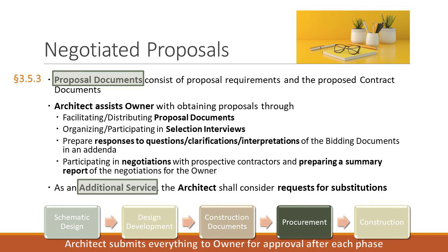3. Preparing responses to questions from prospective contractors and providing clarifications and interpretations of the proposal documents to the prospective contractors in the form of an addenda. And 4. Participating in negotiations with prospective contractors and subsequently preparing a summary report of the negotiation results as directed by the owner.